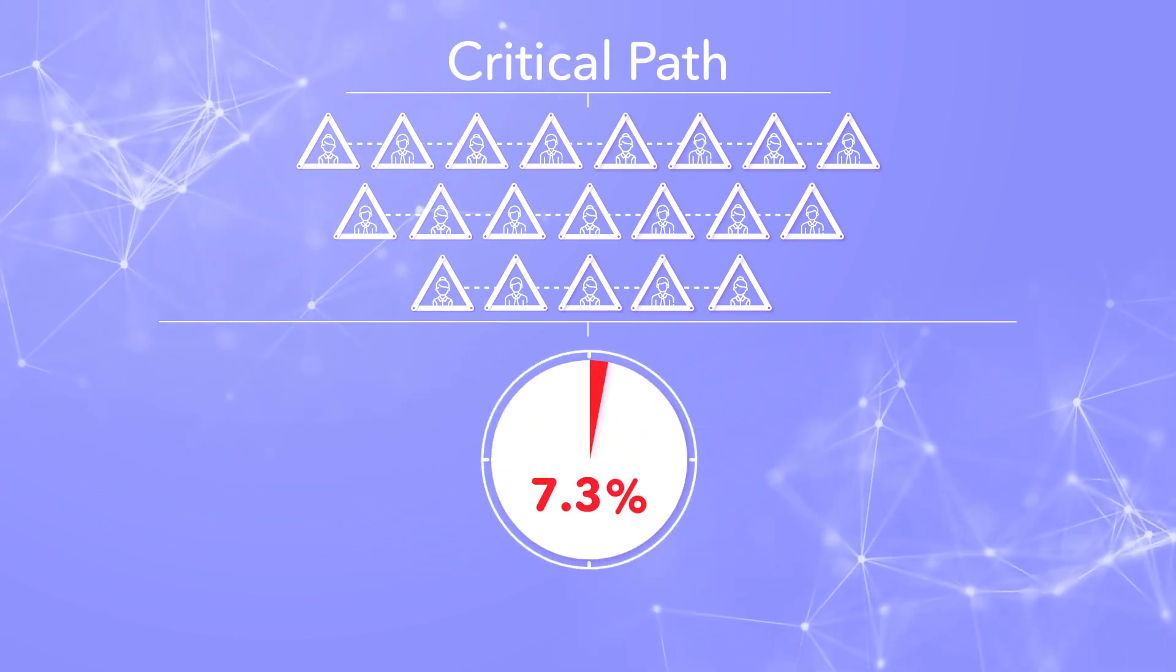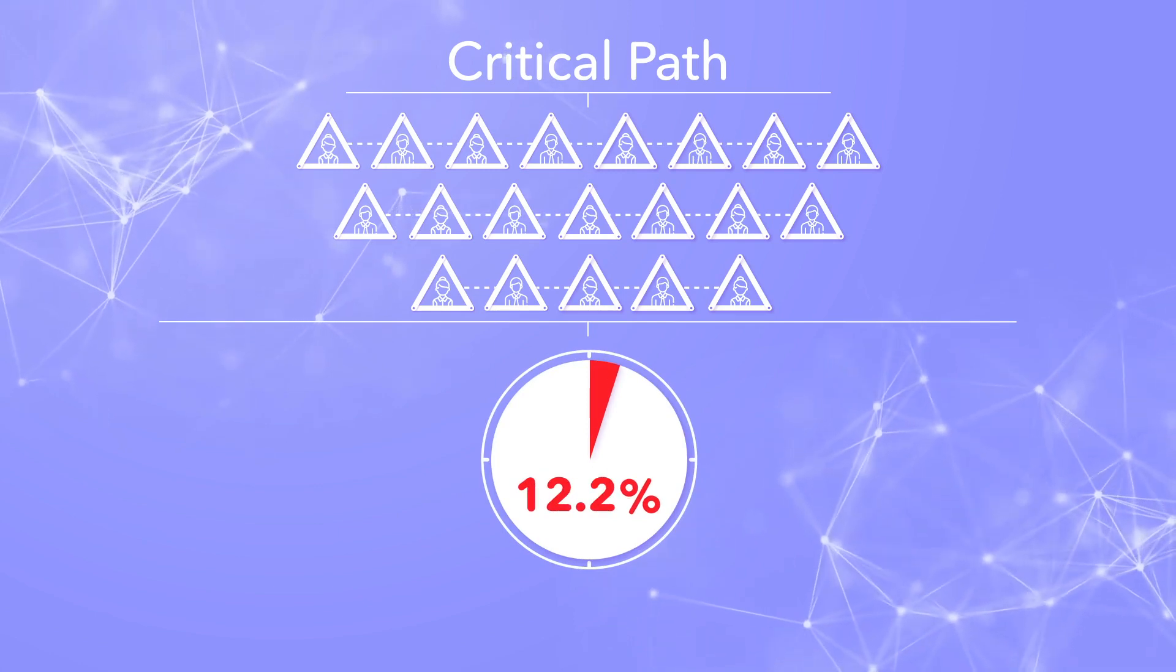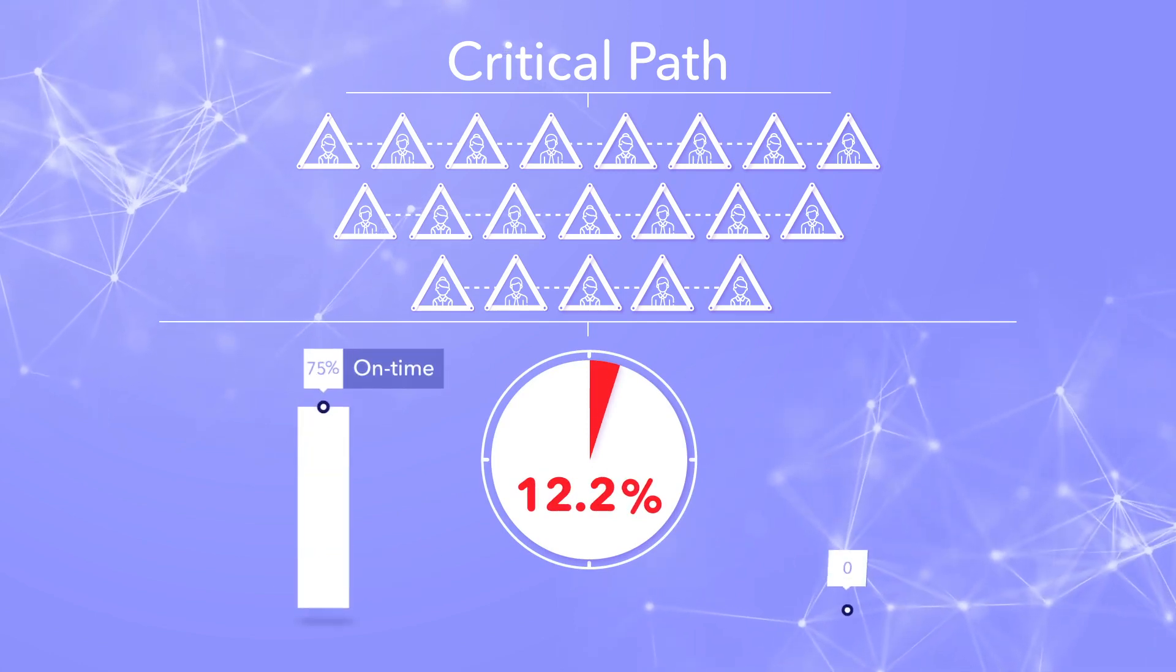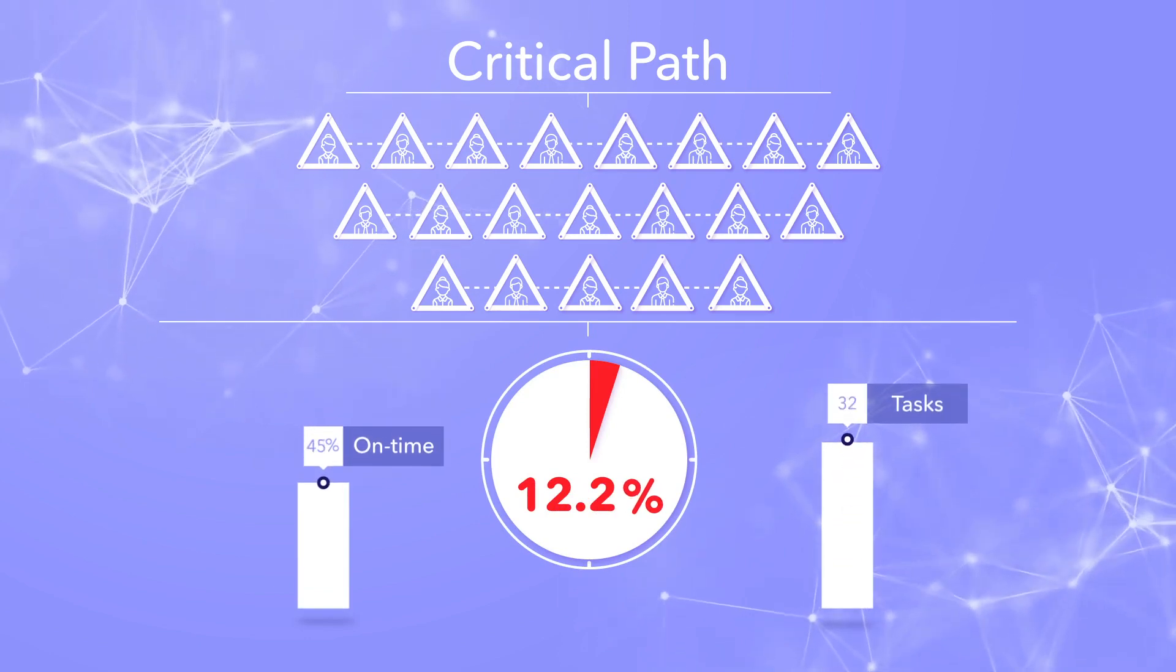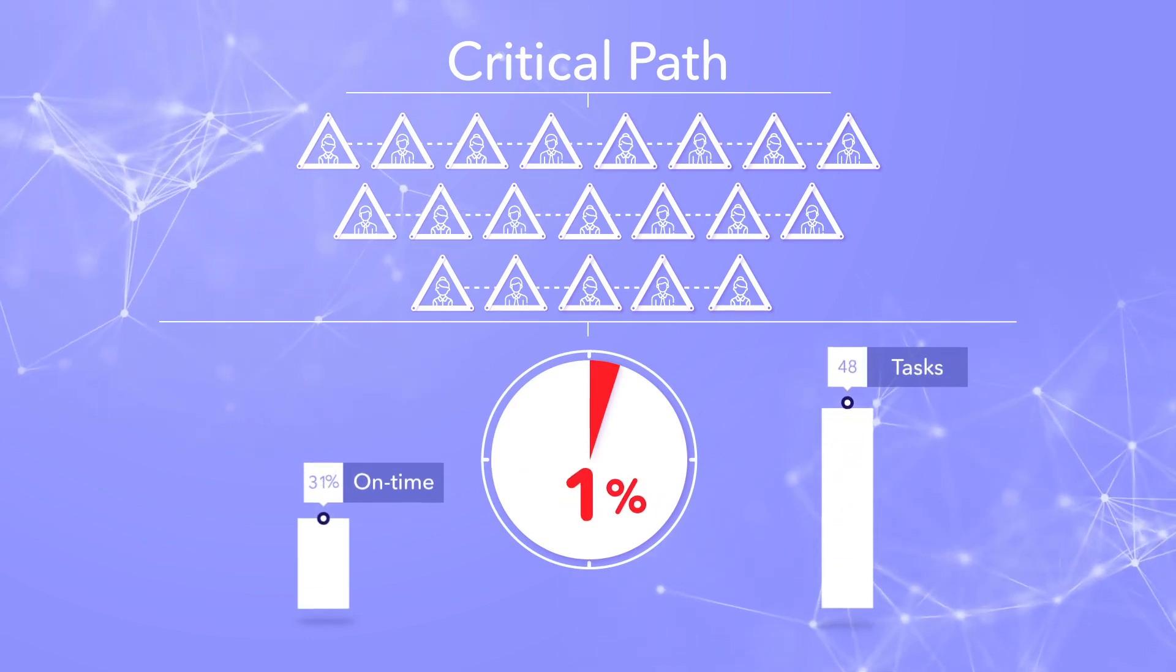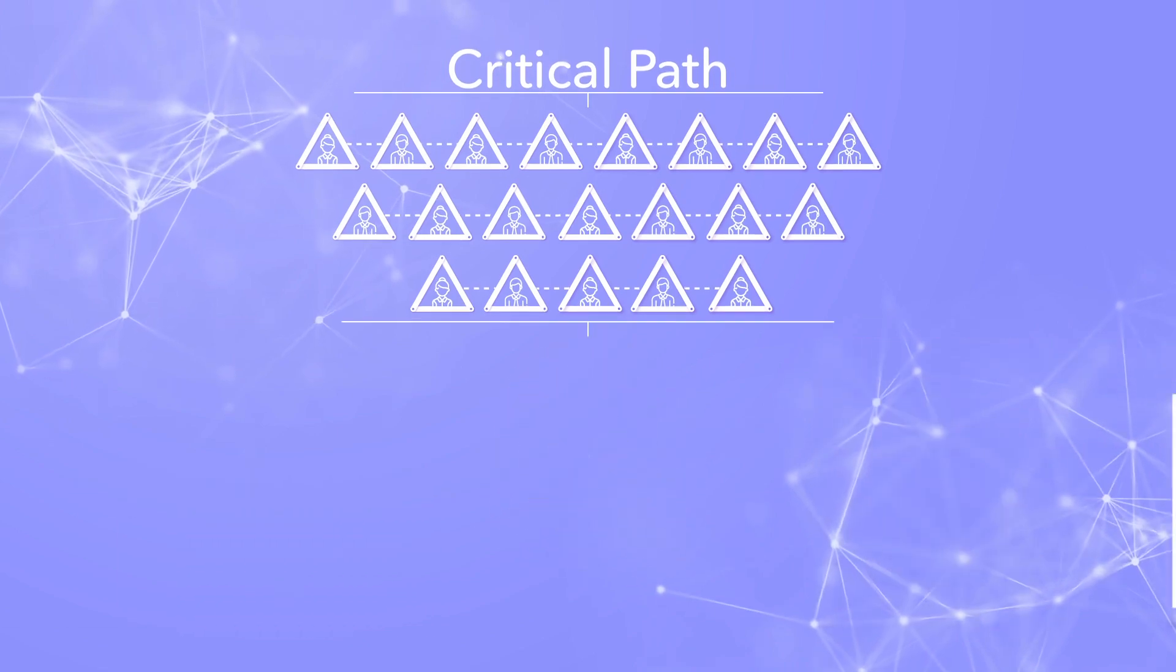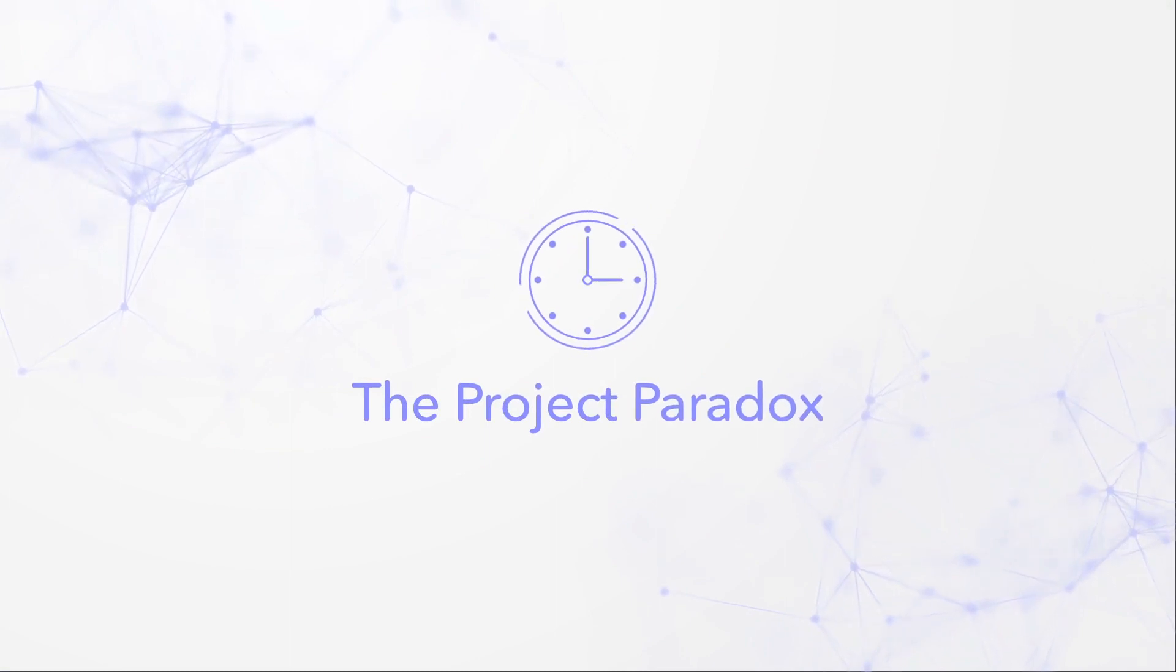Your probability of completing that project on time is only 12.2%. And as rates of on-time completion drop, and the number of tasks in the critical path increase, your odds quickly become much worse. Even for your highest performing teams. We call this the project paradox.